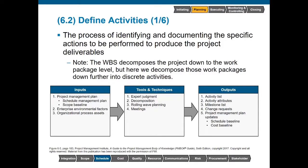Just a quick reminder: when we were working on the work breakdown structure, we would decompose the deliverable down to the work package level. The work package is the lowest level of a component of the deliverable while still being a component of the deliverable. The example we had used previously is of mashed potatoes being a part of the dinner. By itself, we can eat mashed potatoes, but if we try to decompose it further, we're either going to start discussing the resources needed to make mashed potatoes or we're going to start discussing the activities to create the mashed potatoes.